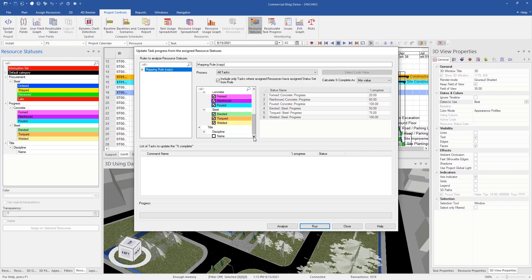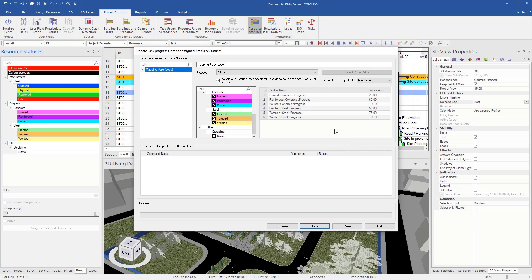So as we can see here is that my formed progress resource statuses were 20, the reinforced were 60, the poured is 100. So now when we assign these resources in field, it's going to update the schedule with this progress percentage. So take a look at that in a further training video.